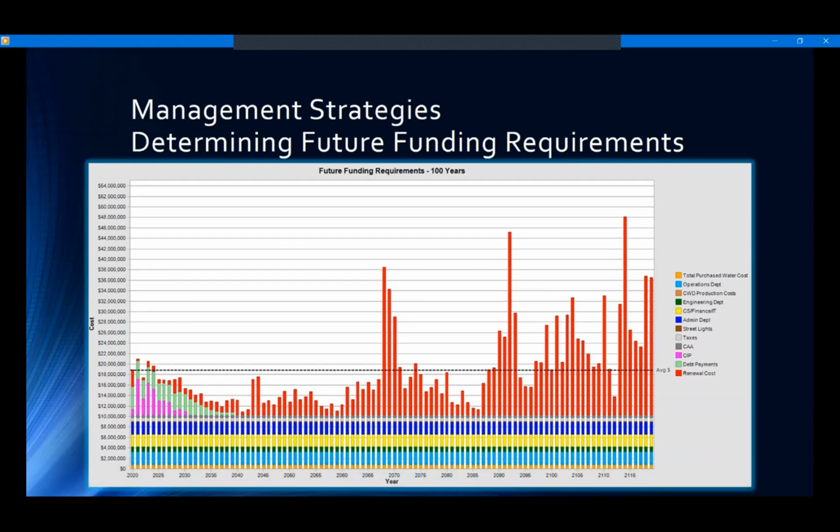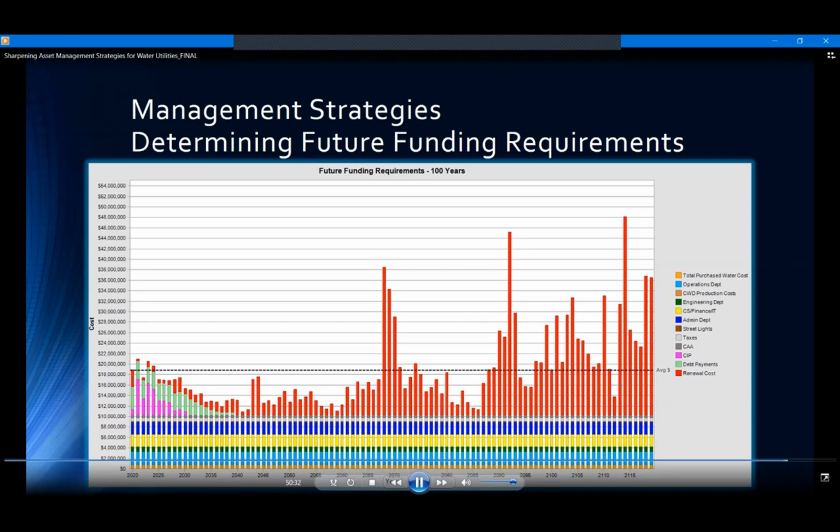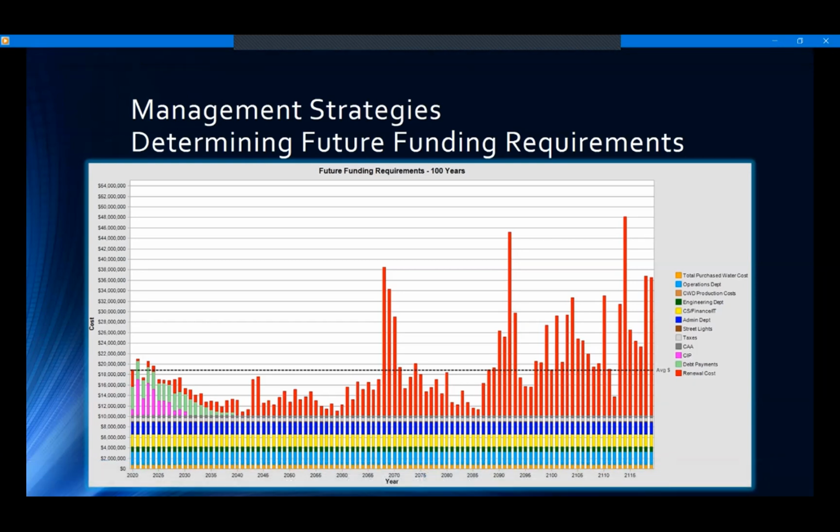So what you're starting to see is those pipes that generally have around 100 years of remaining life starting to show up here, in the future. So again, it's not something that we necessarily have to manage in the short term. But even going back to that rock pile of that 2.5 million back in year 2020, those are things that we would dig into deeper, especially in Dan's ops world, where I'd ask him, hey, go look at these particular assets and see if they truly are at the end of their useful life. And obviously, hopefully, some can be deferred for the next several years. But if not, we'll have to queue them up and create a CIP project for them as well.